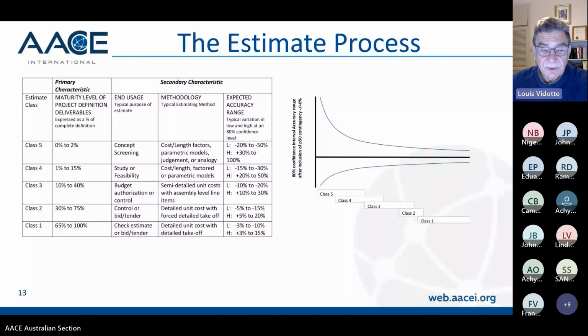Contractors will tend to do a bid or tender estimate based on a bunch of quantities that have been taken off, which are probably getting towards IFC. And the detailed takeoff. If quantities aren't sort of designed yet, then it's going to impact the accuracy range of that estimate. And also too, contractors will then take a view on what margin they need to allow, or where they have to boost up the estimate or take a bit of a risk on what the quantities are like.